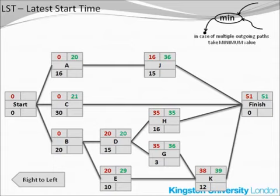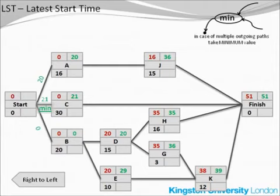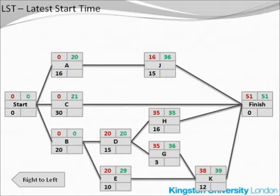There is a similar case with activity B, for which the latest start time may be either 0 — if you look at activity D — or 9 if you look at activity E. The minimum is 0, and so this is the latest start time for activity B. Looking at the start node, the incoming values are 20, 21, and 0, and the minimum is 0. We have now completed the calculation of the latest start time.